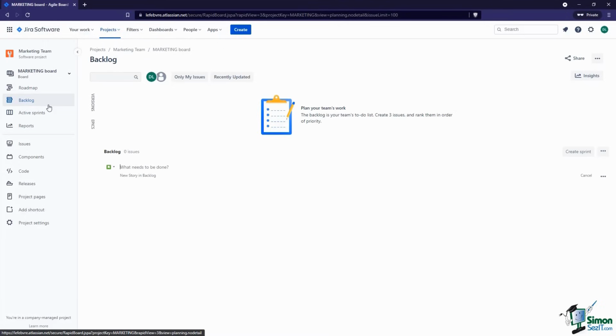Now, I know there will be times where there are emergencies and things really have to be added. But the goal of the sprint is we've decided that this is going to be the work that gets done. If there's new work that comes in, then we're going to have to take something else off. That's just the workflow that happens because you can't make up more time in the day. And we've already allocated all of the time for things to get done.